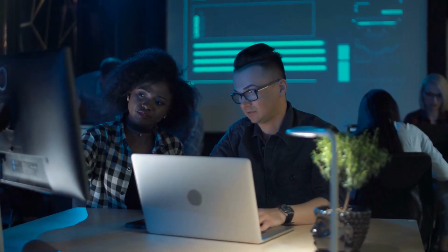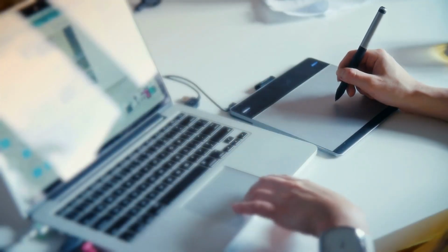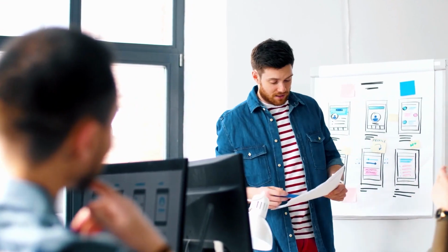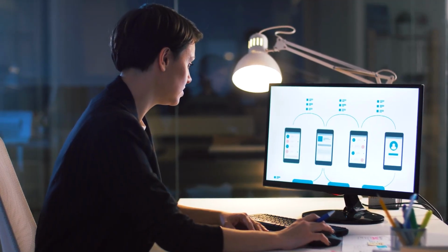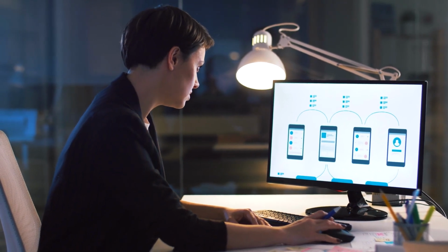So let's take this scenario, right? Imagine your team is building a user interface, right? That is dependent on another team, might be the UX design team, to actually come up with the initial designs. So your team needs to make sure you're working in collaboration with the UX design team to understand when they can complete that design phase so that your team can actually start their implementation. Without the completion of the design phase, your team cannot begin their work.